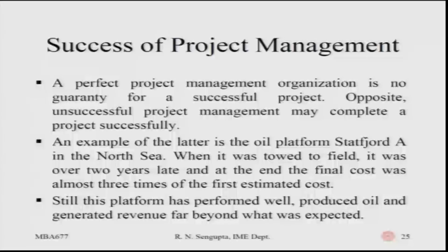Continuing with the example which I just mentioned in the slide, the oil platform in the North Sea. It says that the platform still performed well, produced oil and generated revenues far beyond what was expected, but there was a delay in the initial period. So, obviously, from the project management point of view, it may not have been successful, but from the project point of view, in the later years the returns were much higher than what was really expected from there.